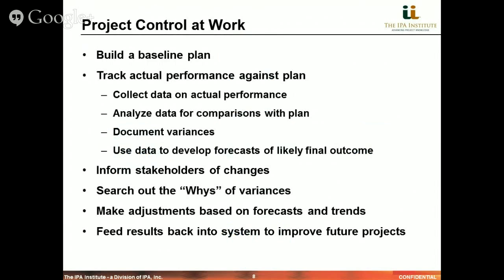Now, to walk us through a fundamental project control process at the highest level, you can lay it out like this. You build a baseline plan, you lay out your plan, you build your schedule and your cost estimate, and you track that actual performance against the plan.